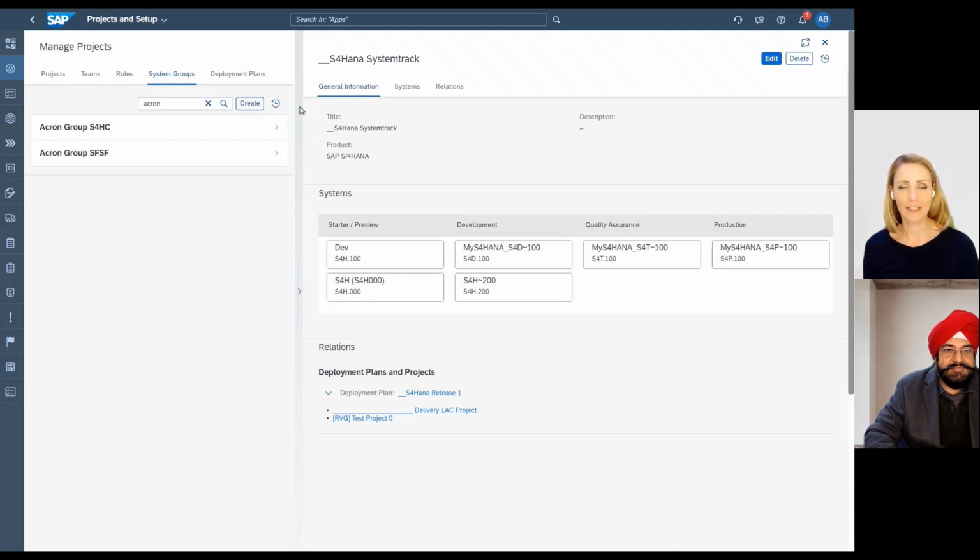I think you got it exactly. Yes. Okay. So that means I need an entity that bundles them together, but still gives a common timeline. So that entity should have a time dimension as well as a landscape dimension. And that entity is called a deployment plan.